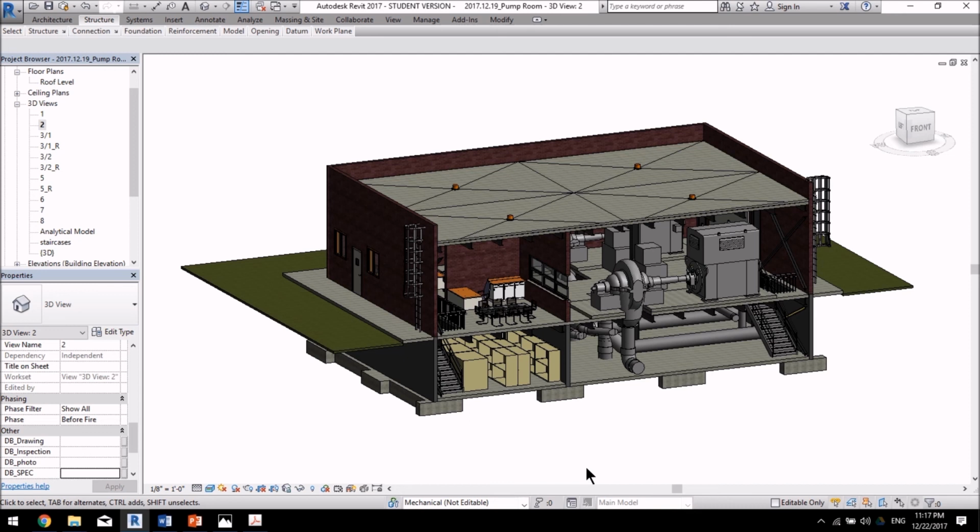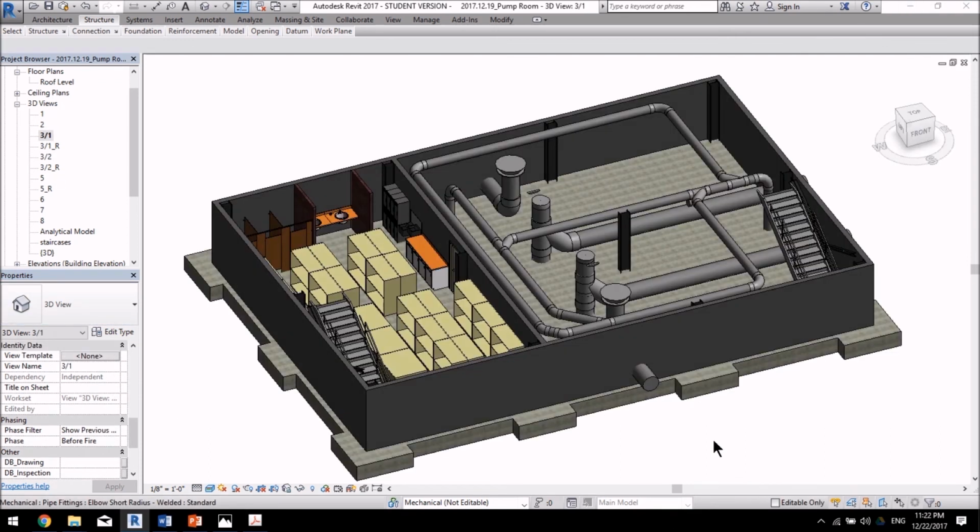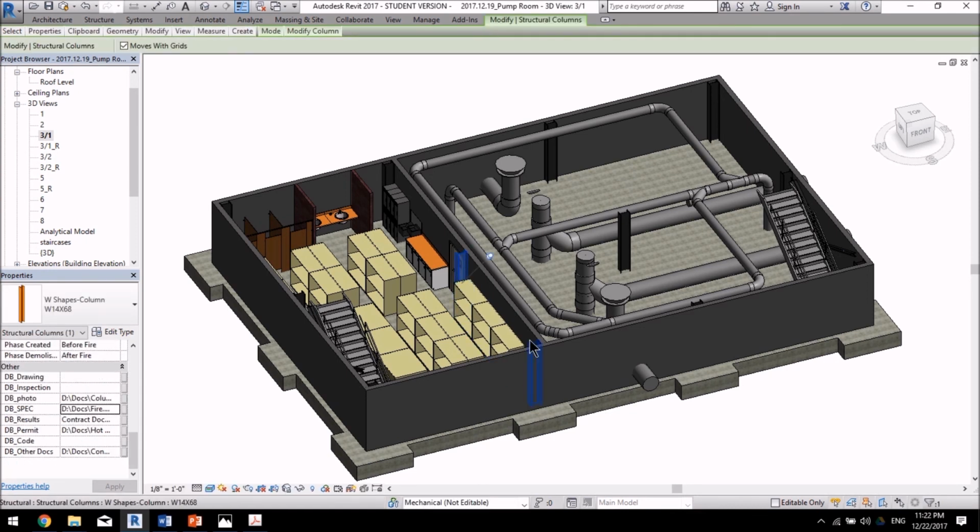In spite of these two issues, still, the contractor accepts the responsibility to compensate for damages inside the storage room, but not outside the room, even though the FP Insurance claims they were caused by the buckling of the columns inside the storage area. Because, as I explained during the presentation, these columns did not resist the fire as much as they were prescribed in the standard, indicating that they did not meet the standard requirement.